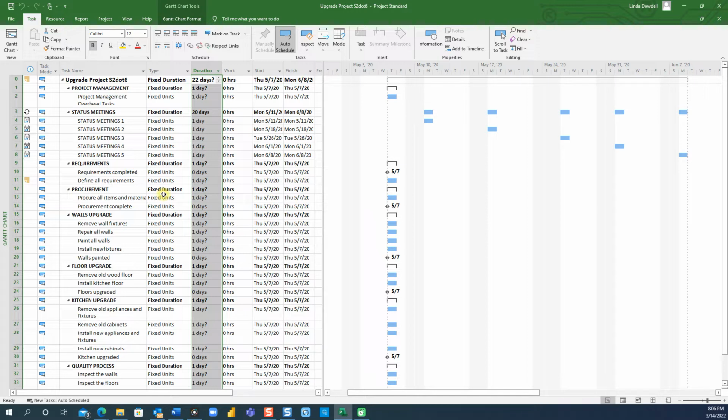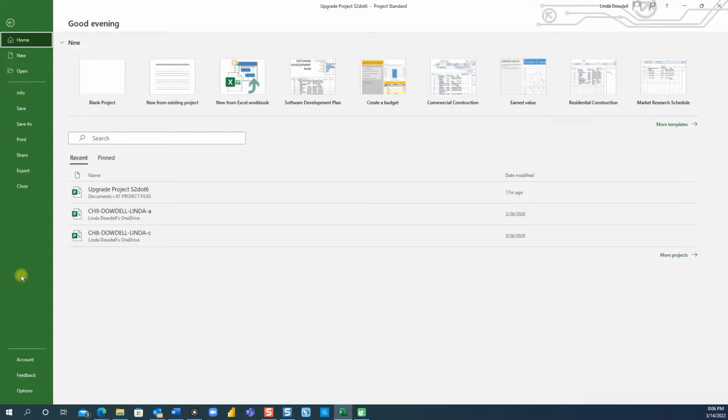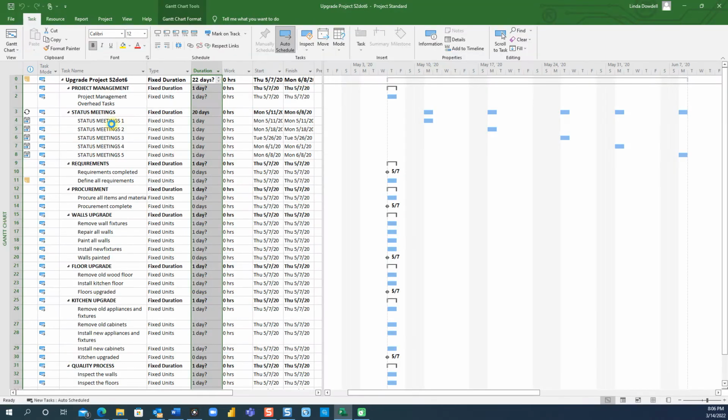And business days typically fall on weekdays and are set up in project calendars, as you saw in previous sections. But by default, business days are set up from 8 a.m. to 12 p.m. and then from 1 p.m. to 5 p.m., representing an 8-hour workday. So let me just take you there very quickly by going into File, Options.